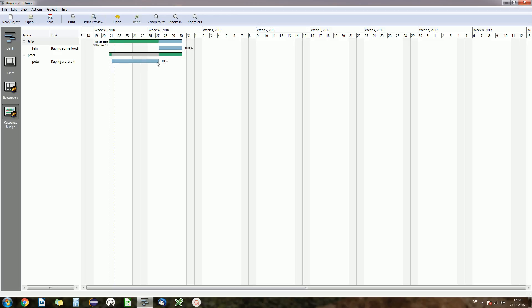So for me that means in this period I'm hundred percent planned, and Peter is 70 percent planned. So if you were to add multiple tasks and assign a resource to multiple tasks, you would quite fast see if you have more than 100 percent workload on one person. And in bigger projects I think you want to track that so you can plan your tasks better.